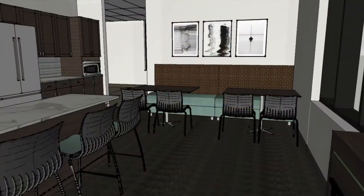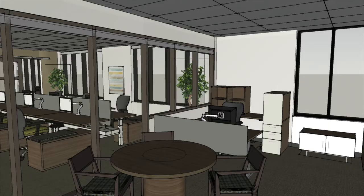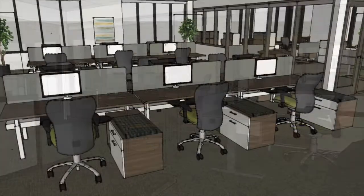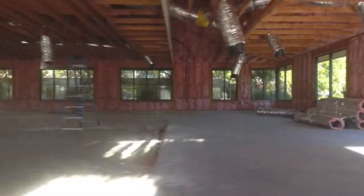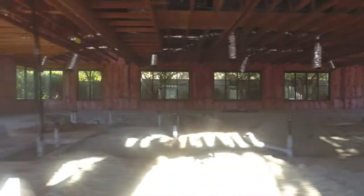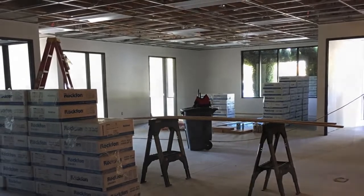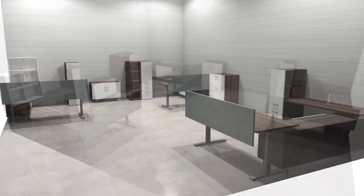The design process included presentation of finishes in loose format and then rendering the selected options to allow the client to better visualize what would actually be built. Once the design decisions were made, CDG completed a costing plan detailing those decisions. This included a complete finish schedule as well. The plans were bid by multiple general contractors for cost control. Once the construction project was awarded, the engineering drawings were provided through the general contractor.